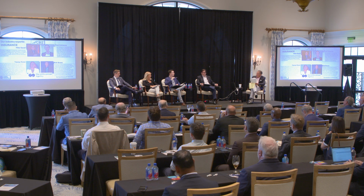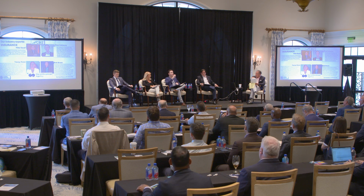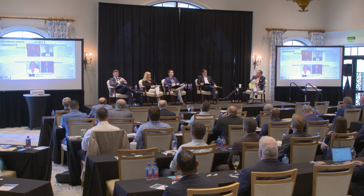Well, and to go back to your original question, Kurt, flood walls is the perfect example. We've seen clubs do a $7 million project, and it's all interior renovations, new carpets, new fixtures, fresh paint job, and none of the money is allocated towards improving the risk. So there's only so many variables to consider: the impact glass, the roof, having additional straps to prevent it from flying off. But when you're looking into doing a capital improvement project, consider allocating part of the budget to improving the building, not just improving what the members see when they experience it.